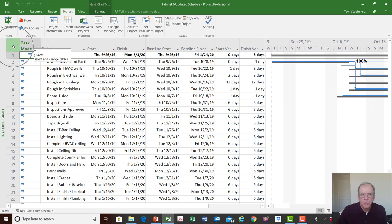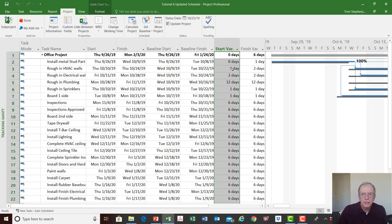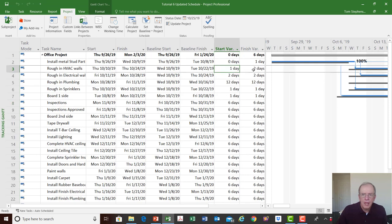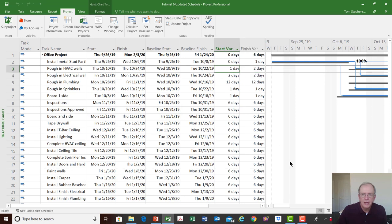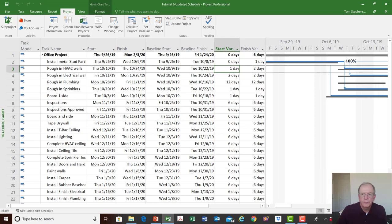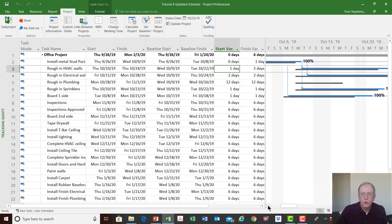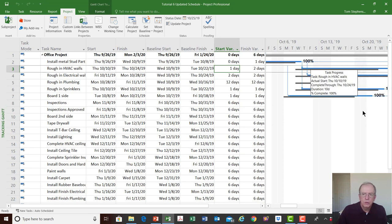The difference between the bottom bar and the upper bar gives you the variances. It's also helpful to right-click the square icon box and go to the variance screen. The variance screen tells you the difference between the start and finish for each activity. I can see that the second activity, rough in HVAC walls, started one day late and finished two days late — all in working days.